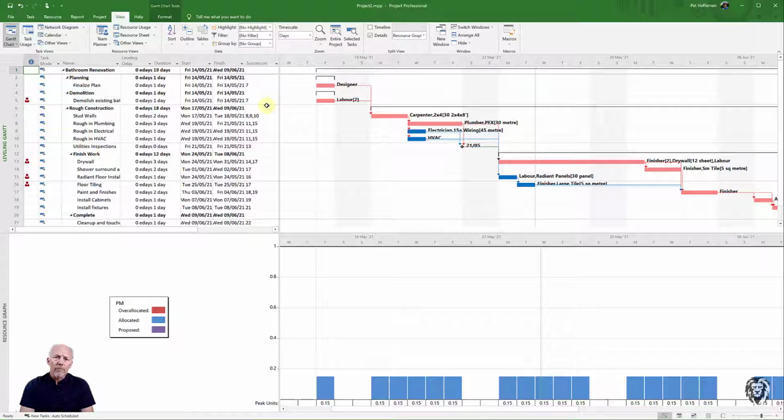For the most part, if we have the right resources assigned to it, there's a number of things that we can consider. First one is we can start to change the duration of particular tasks to try to buy us some room. And there's two ways to do that. We can assign more resources to make them shorter, or less resources but take more time to do it. And you would have to consider the trade-offs, the advantages and disadvantages of those. Because some resources or some tasks, not all, might be achievable with fewer resources, but just take a longer period of time.